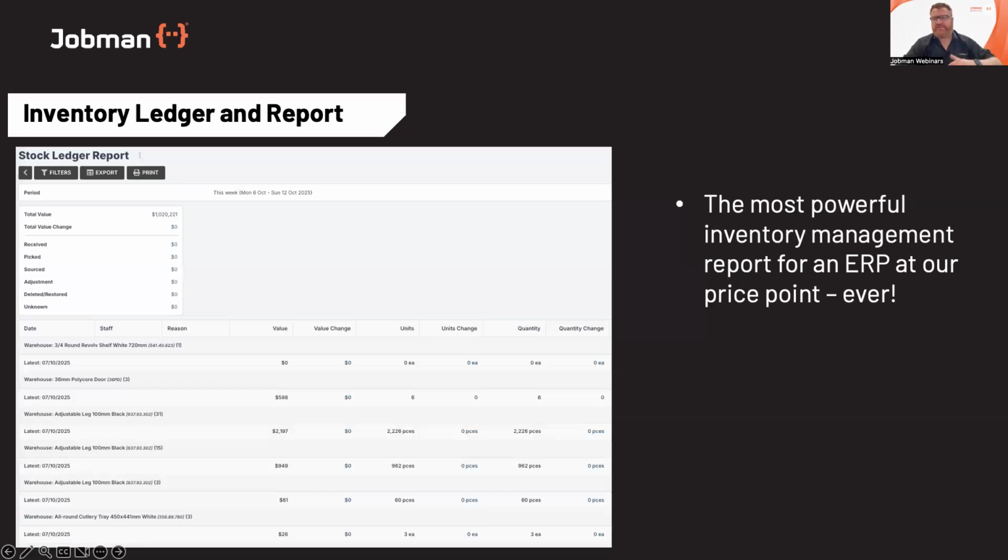So understanding and seeing that, you bought those 10 boards in, and you've estimated on those 10 boards, and then your CAD and design software gets involved and optimizes and nests and says, we can do this in 9. Fantastic. So we go purchase 9 boards. We bring them in, they come into inventory. We now have a ledger report for assignment to job and brought into the inventory itself.